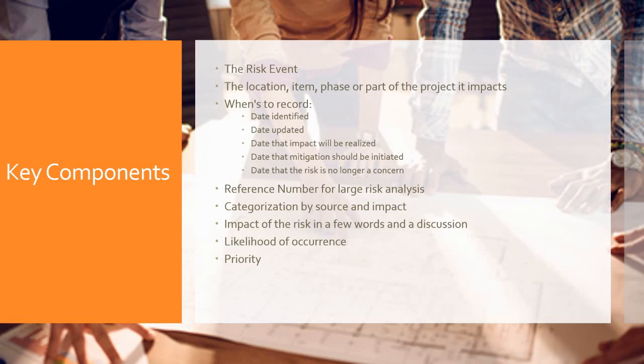These risks that we've prioritized, we develop response plans whether to accept, transfer, or mitigate the risks themselves. Now, to ensure success, we also need to include an owner for each risk, and that owner will be responsible for monitoring the risk throughout the project lifecycle.